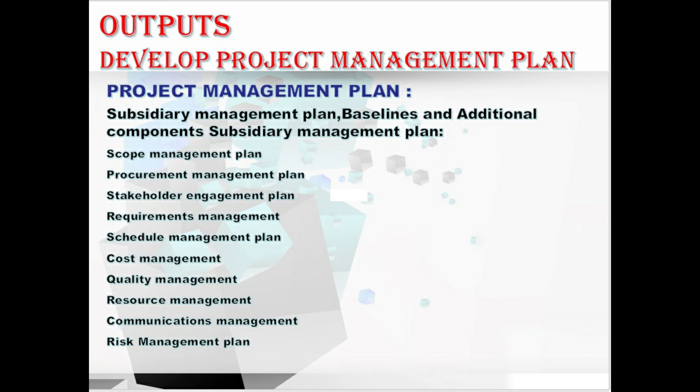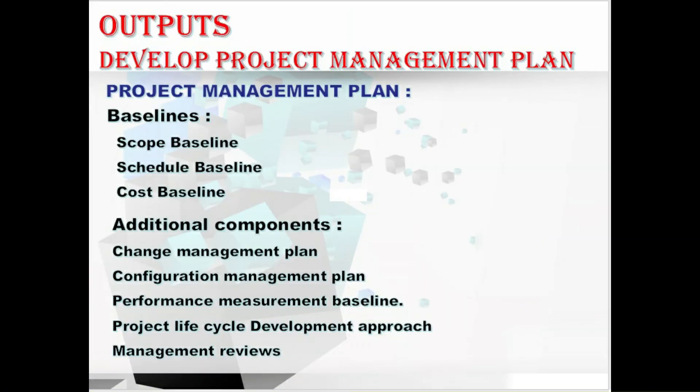Coming to the baselines, we have the scope, schedule, and cost baselines. And coming to the additional components: we have the change management plan, configuration management plan, performance measurement baseline, project life cycle, development approach, and management reviews. These are the components of the project management plan. Hope you understood about all the outputs of this developed project management plan process.